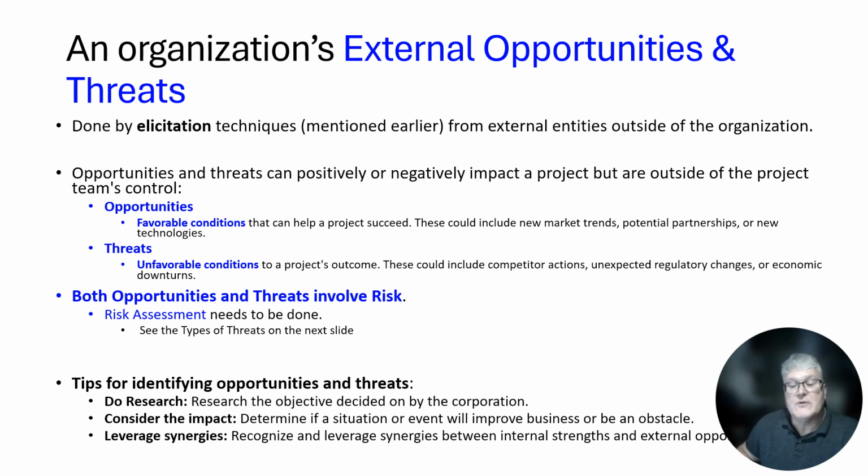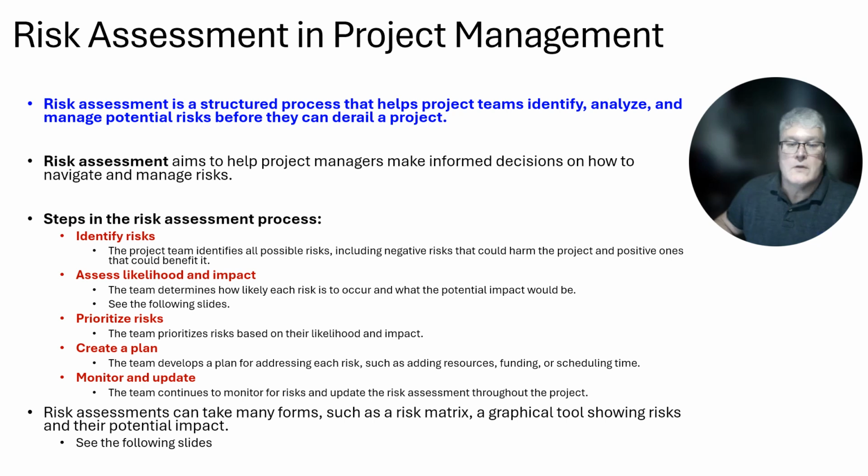Remember that both opportunities and threats involve risk. And because of that, risk assessment needs to be done. I'll talk about risk assessment here in the next few slides. Risk assessment is a structured process that helps project teams identify, analyze, and manage potential risks that can have an impact on your project. The steps involved with risk assessment include identifying the risks.